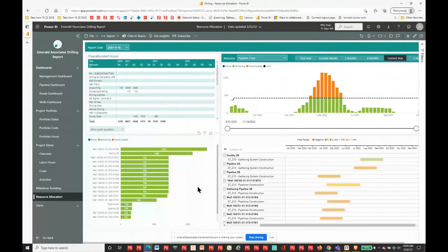You might want to go through and have a look, thinking to yourself, well, I know the priorities on the projects in this particular group. So at what point am I starting to generate this overload? Can we take the highest priority ones and still deal with them? Or in order to deal with the A-level code projects, for example, do we still have to look at moving some projects or increasing resources?